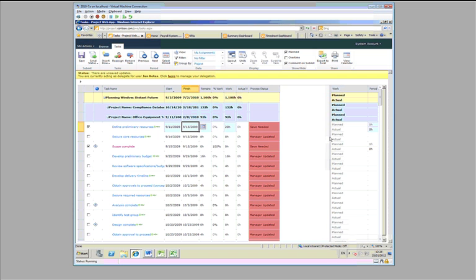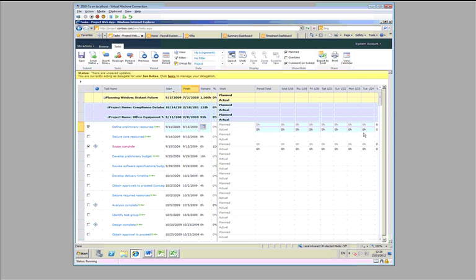I can even go a level further than that and start time phasing when I did the work. And this could take us, if we wanted to extend this even further, into the land of full timesheets. So weekly or monthly timesheets authorized by a timesheet manager, and maybe then onto the project manager to update the plans. So there's a wealth of ways that we can capture actual work and progress, from the very simplest, just updating the plan, right the way through to the other end of the scale, to full timesheets. So please do come and talk to us about what the various options are against requirements there.